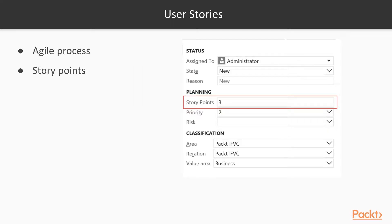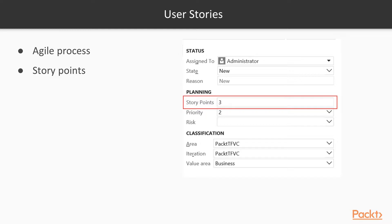User stories are available in the Agile process in TFS. And how you go about ranking or deciding how big is a user story is by using what they call story points. You can come up with a Fibonacci sequence, a lot of teams use. Some indicator that this is a certain size based on a number. Some folks actually take hours and turn them into points. So every point would be 3 hours or 4 hours. So maybe if there's a story point of 2 that's an 8 hour task.